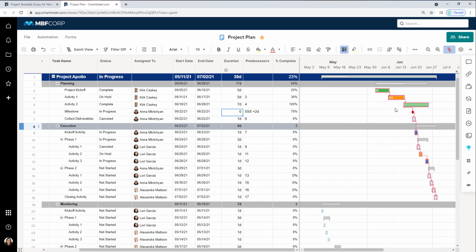Now, because again, I kept this pretty chronological, all of my tasks from row 18 and back are lit up. But if my tasks were not all defined one right after the other, it would only highlight the tasks that are going to be the most critical for us to accomplish on time. Our critical path looks at our project plan as a whole, but of course, my project plan is likely a lot smaller than a real life project would be.